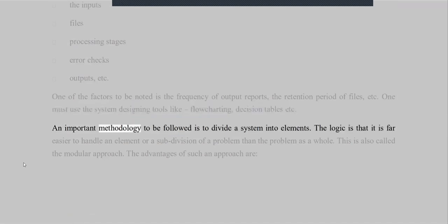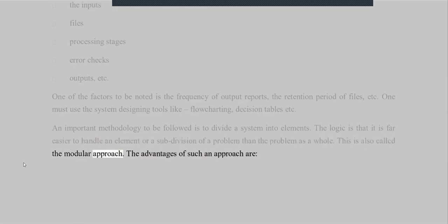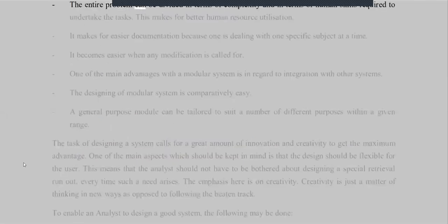An important methodology to be followed is to divide a system into elements. The logic is that it is far easier to handle an element or a subdivision of a problem than the problem as a whole. This is also called the modular approach. The advantages of such an approach are: the entire problem can be divided in terms of complexity and in terms of human skills required to undertake the tasks. This makes for better human resource utilization.